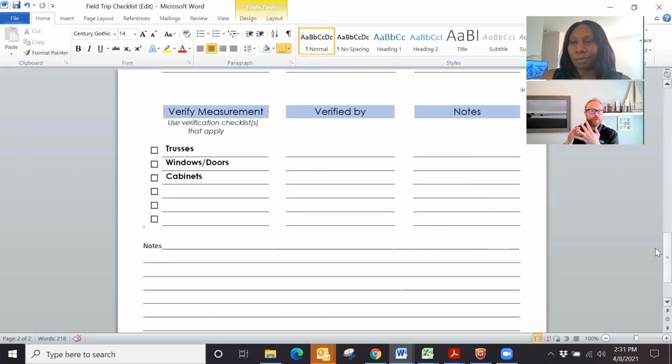By the time we have a crew come in, maybe we have a lead carpenter on site who might be doing some of these verifications. But in theory, that would be a couple weeks after this walkthrough, or later in the job, because it might be a pretty big job, and then you have time to do the initial stages of the job before you measure and order those long lead time items. So this would be the second out of the four different times that we could verify. Yep, absolutely. Just a memory jogger.